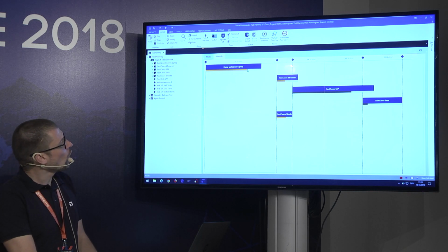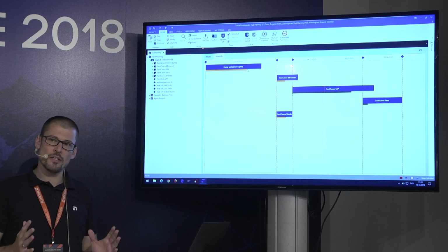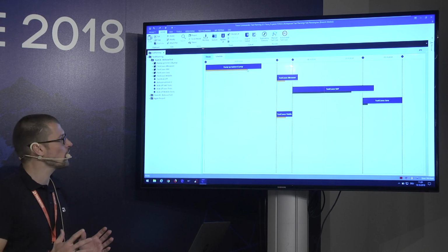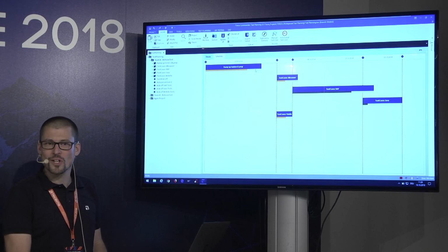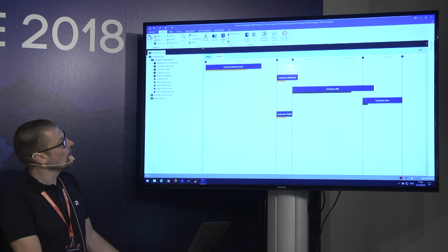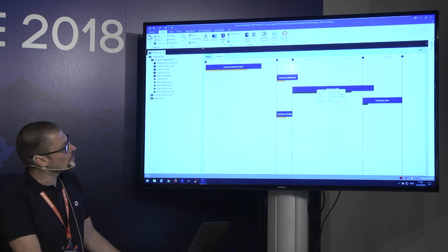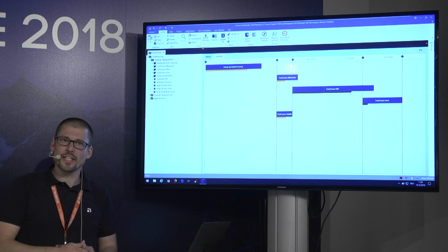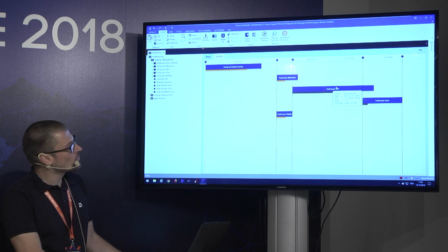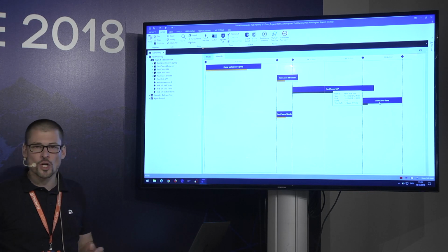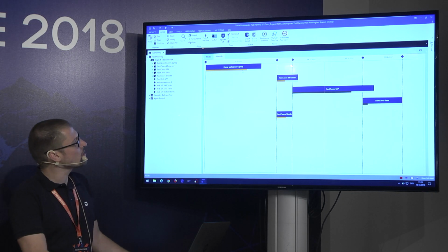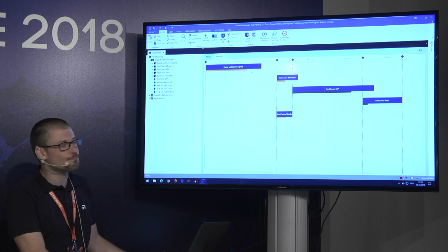So the orange ones are sessions that have ended, but not all the tasks within the sessions have been completed, right? So you might have some tasks left there which you might shift to other sessions or reschedule, or stuff like that. We have the ones in darker and lighter gray, which are still ongoing, as this is today. The test cases SAP and the test cases Java are still in progress, I would say, or have not even started. And if everything is done, it turns green, right?